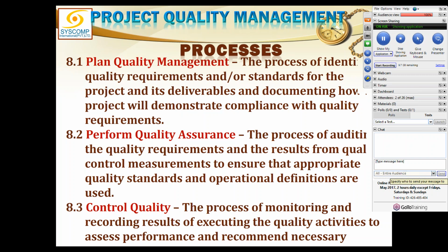If you are confirmed that yes, these people know what to do, the next question is, are they really doing it? Have they just remembered all the processes but are still not doing things the way they were wanted? So you have to physically see on the ground, comparing the processes which are happening with the documents you have just prepared. And if everything is going according to that, then your quality assurance audit is pass. If it is not, if there is a small mistake somewhere, they are not following one odd point, probably you can instruct them and assure that they follow those steps in future.